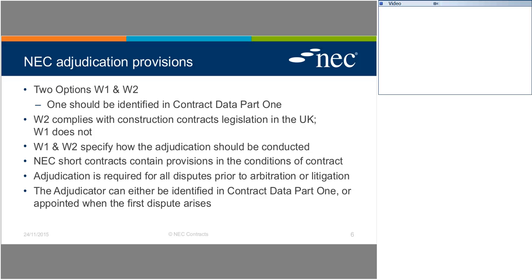I think it's safe to say that it's unique with NEC contracts that adjudication is required for all disputes prior to a party referring it to arbitration or litigation. And both options state that you cannot take your dispute somewhere else until the adjudicator has issued a decision on it first.